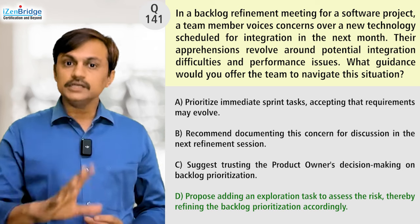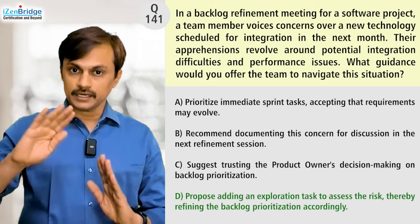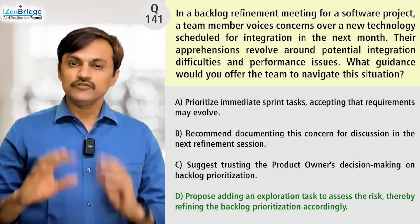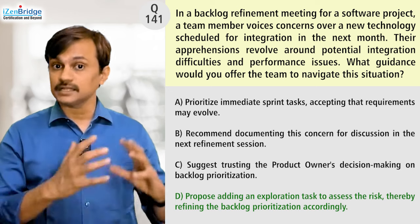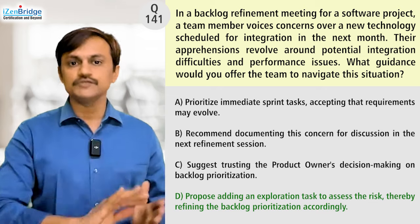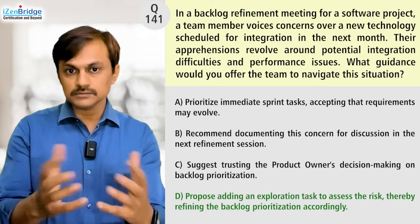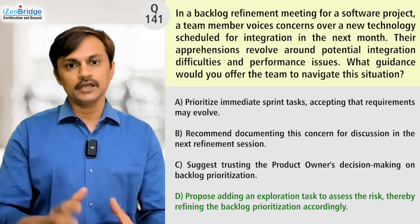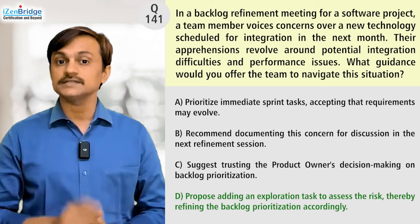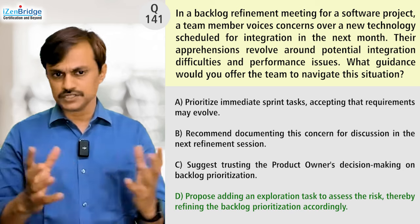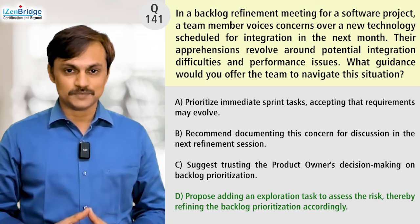So what are we learning? In the agile way of working, we still need to do risk identification and risk responses. The backlog and backlog refinement should contain possible action items to mitigate or respond to risks. If something has been flagged, we need to explore it and prioritize the backlog based on risk and value. All these ideas come through in Option D, which is the best option.